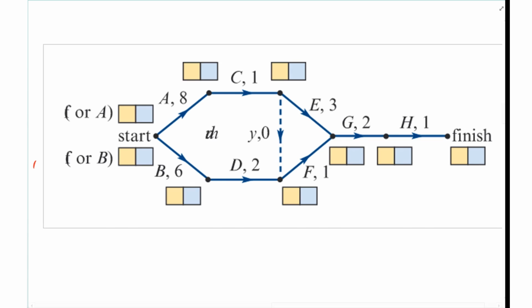So basically what we're doing here, we're saying from A, so from the start point, I'm going to have to put 0 and 0 here. The reason I put 0 and 0 is that that's the earliest I can start, at 0, because it's your starting point. As I get to C, the number I put here is 8, because before I can move on to C, I've got to wait 8 minutes.